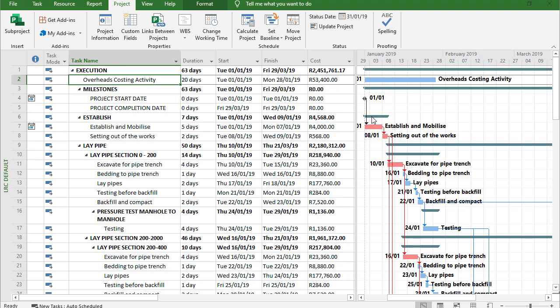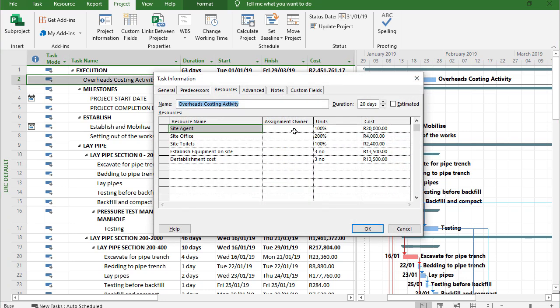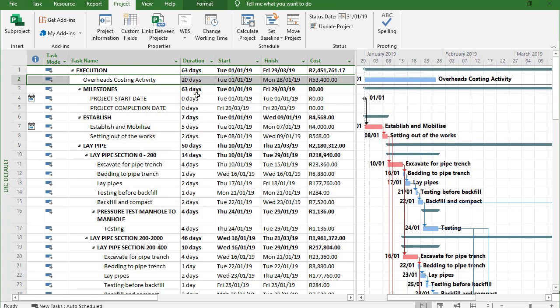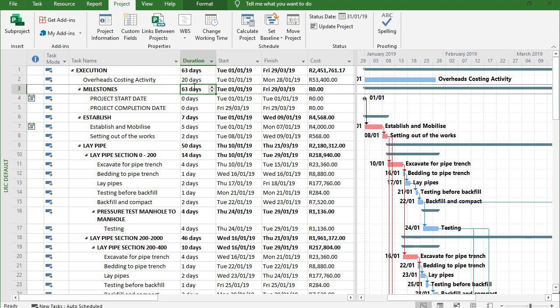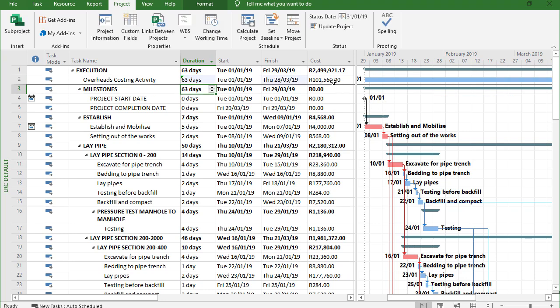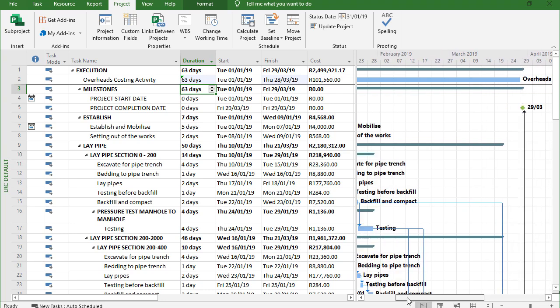If you look at this costing activity I've got my resources loaded onto it, so I've got a site agent, office and toilets, and then establishment and de-establishment. This is just an example to show you. If I click on OK, I can simply go and use the project's duration which is 63 days and just punch it in there, and you'll see my cost is adjusted and everything stretches from start to finish.